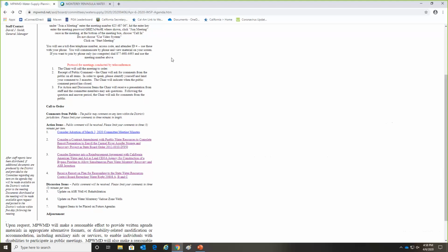Then at the close of the water year in October, we'd have a clearer idea of what the pandemic was looking like, and it would be safer to move into that window and then have it up and running for the next injection cycle. So basically a deferral, and Zim Industries will keep their bid open at least through October.